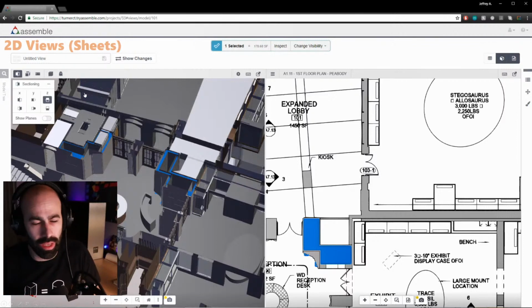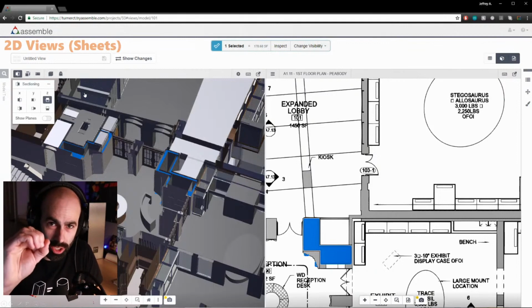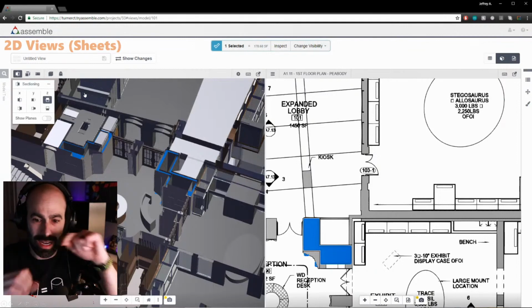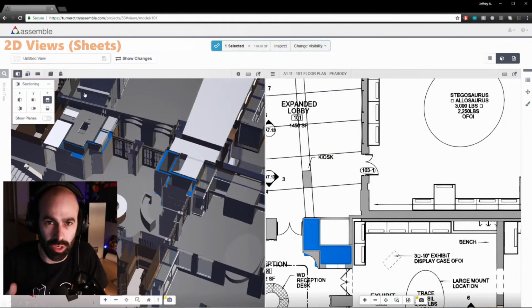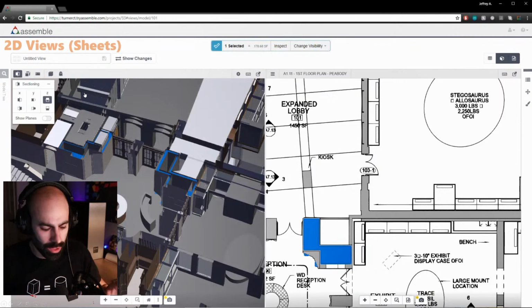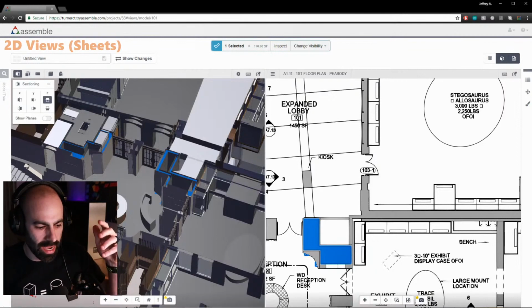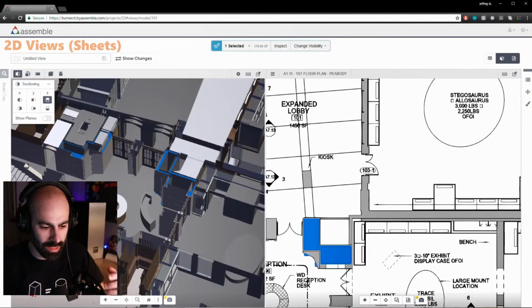For lighting takeoff, as a perfect example, you go on the reflected ceiling plan, there's a P2 light fixture. You click it, and then you can filter through the properties coming out of Revit and look for P2, and then you know what parameter to look for. It's a type mark, and now you can search and use that. Really, really super cool, and a really good way to have non-Revit users accessing Revit data.